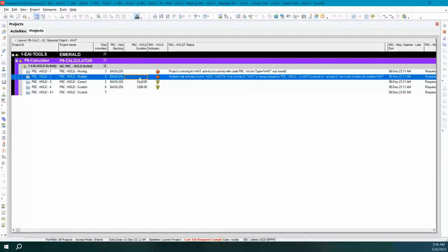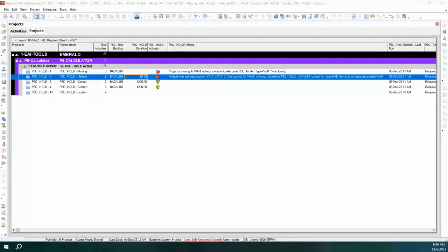I might need a longer window. This is done in hours because everything in P6 is done in hours. So if I want a 4-week, which is 20 days, and I need it to be 8 hours a day, I can make it 160. So I can make these different lengths. I don't have to live with one option only.